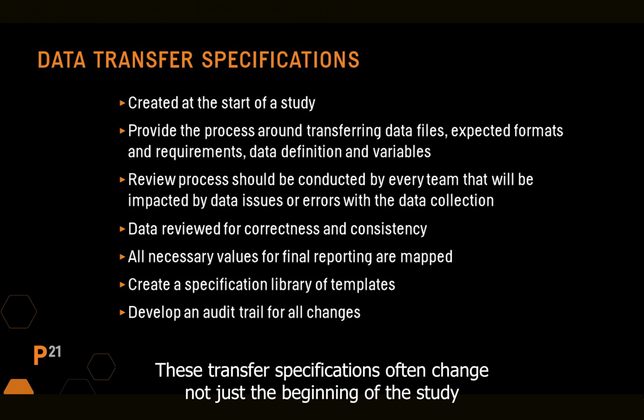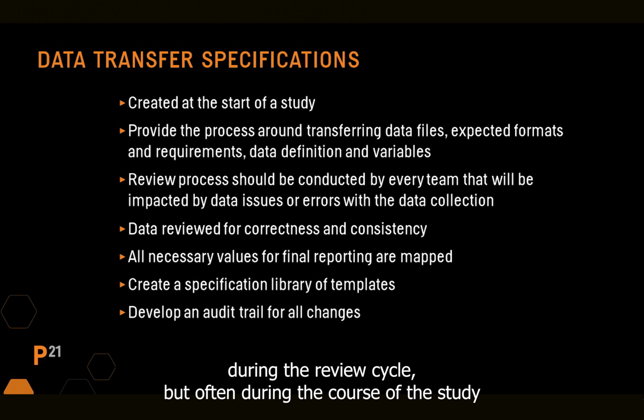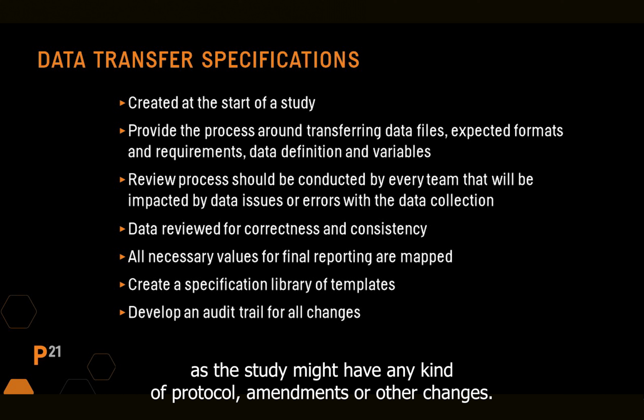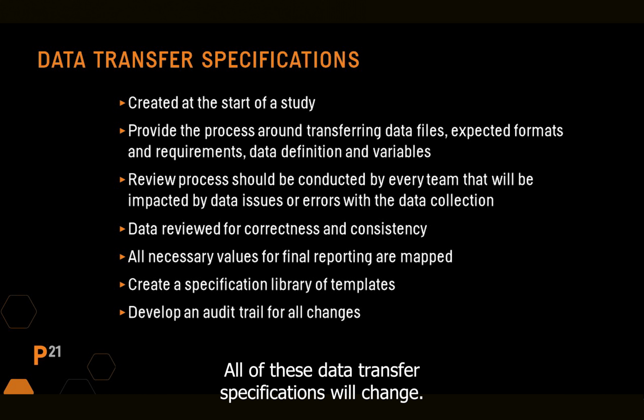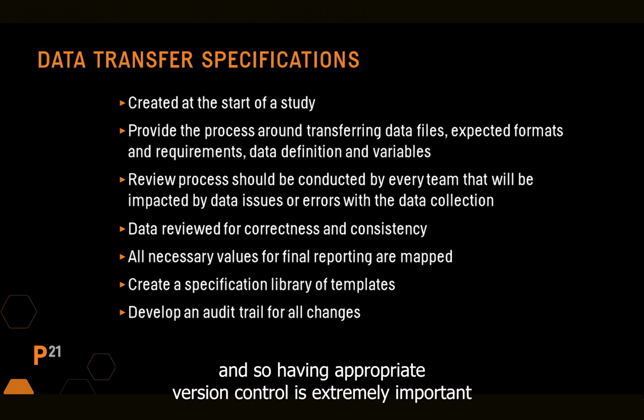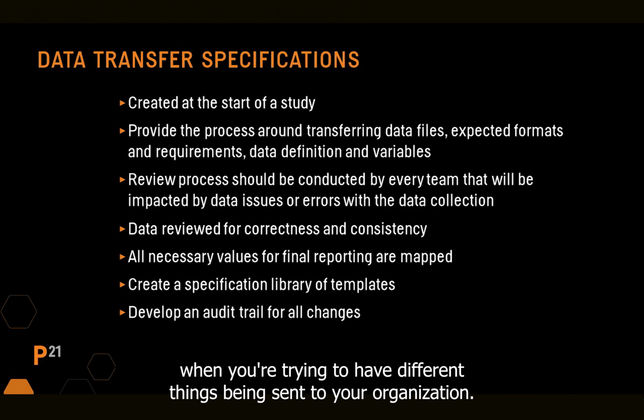These transfer specifications often change not just at the beginning of the study during the review cycle, but often during the course of the study, as the study might have any kind of protocol amendments or other changes. All of these data transfer specifications will change. There's typically multiple versions, and so having appropriate version control is extremely important when you're trying to have different things being sent to your organization.